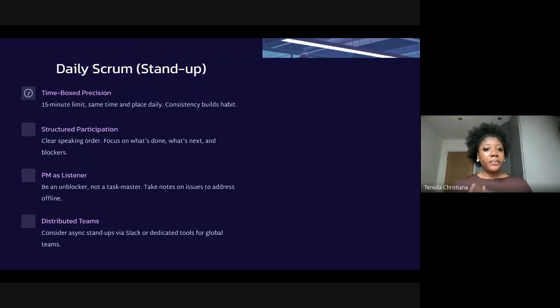issues offline. For teams that are distributed, you're all in different time zones, doing stand-ups via Slack can be really useful, and you can just do it async. Some members might not be able to join at the time that you're available, but just making sure you have time with your team members, with your stakeholders on a daily basis, where you quickly talk about what's been done, anything that's left, and any issues is very important. So that's another ceremony, daily scrum, or a stand-up as people call it.